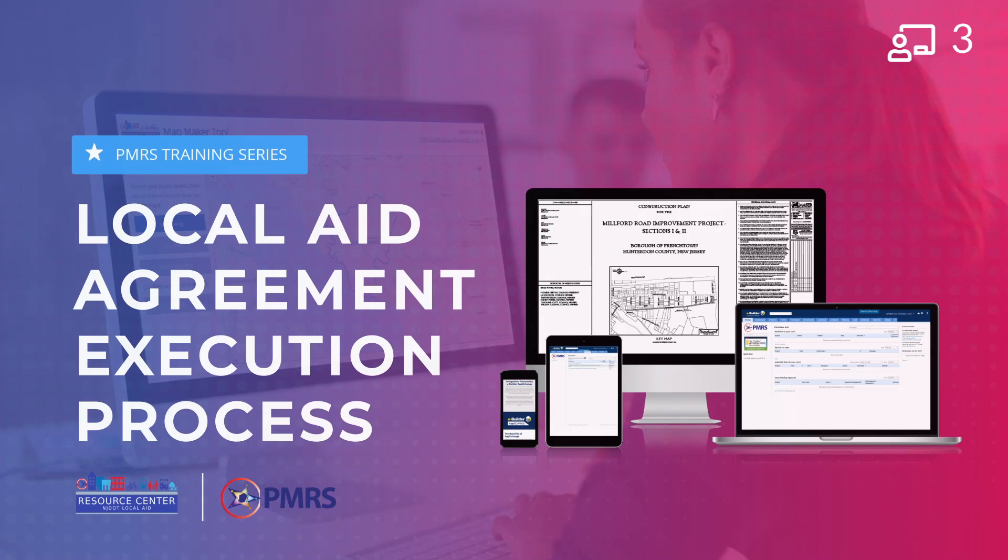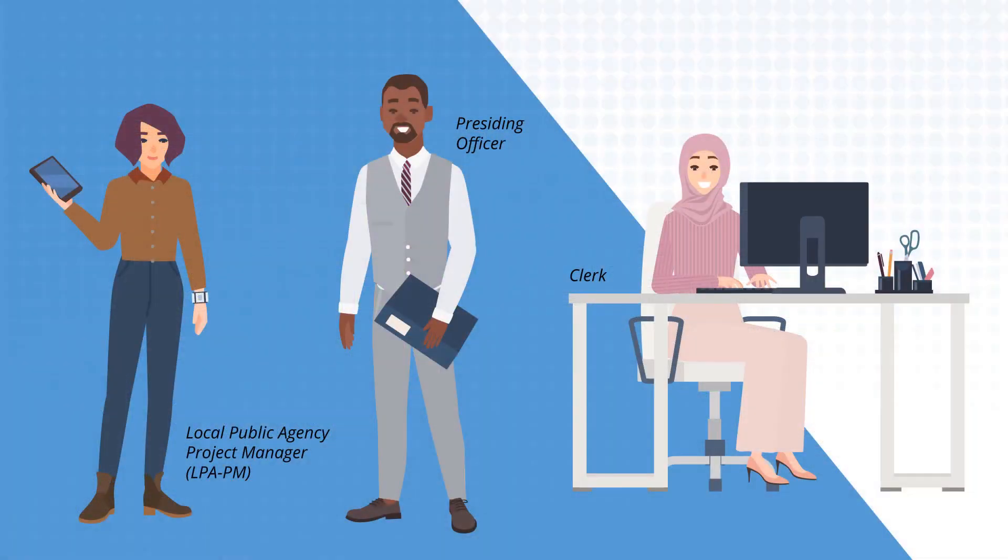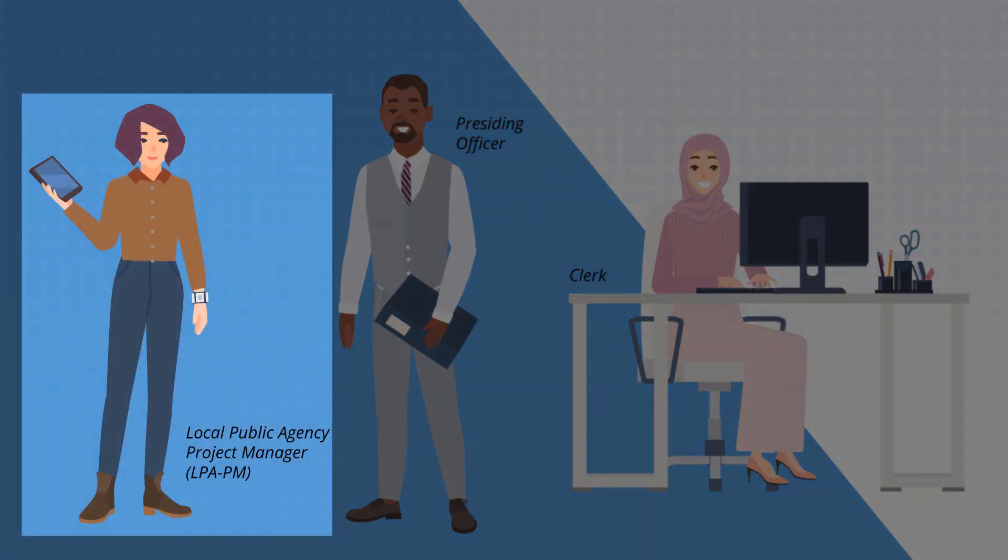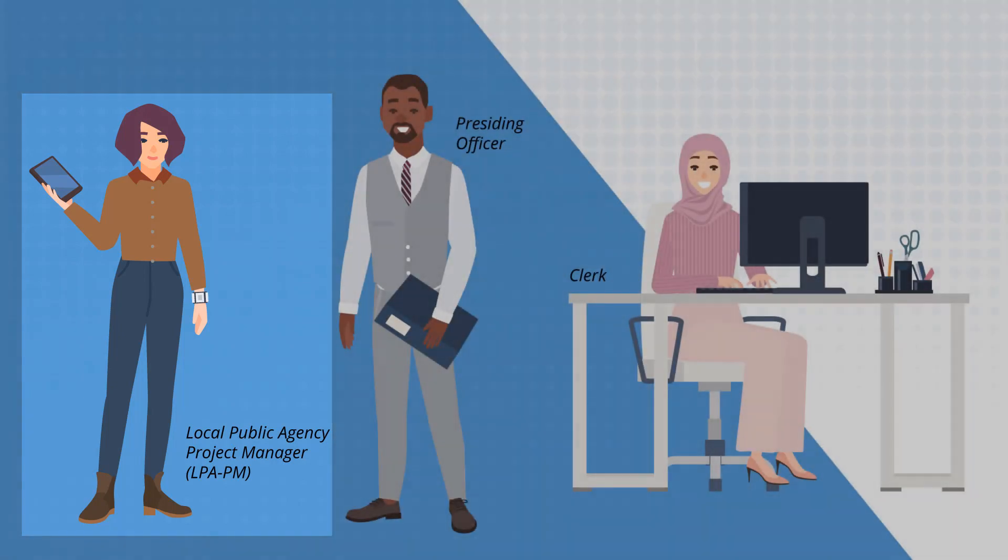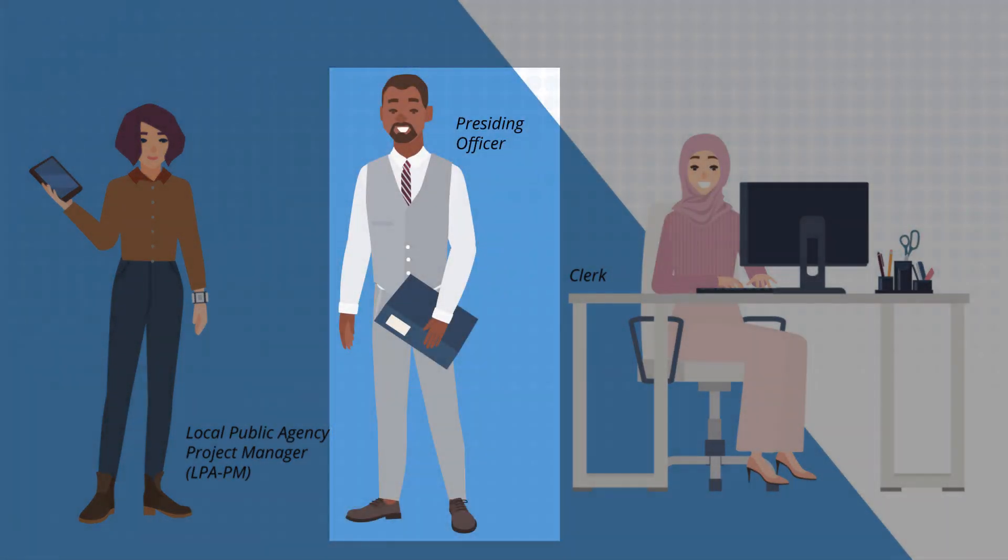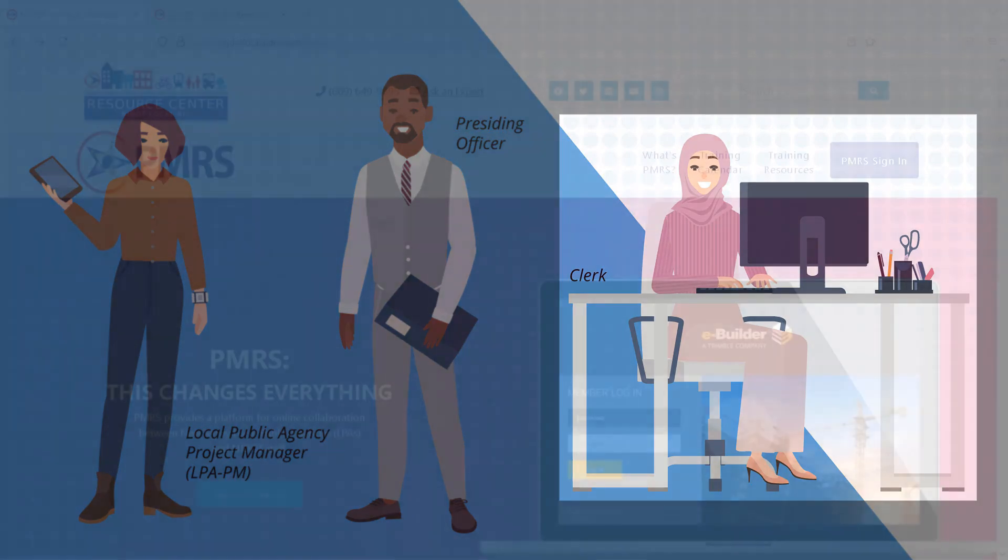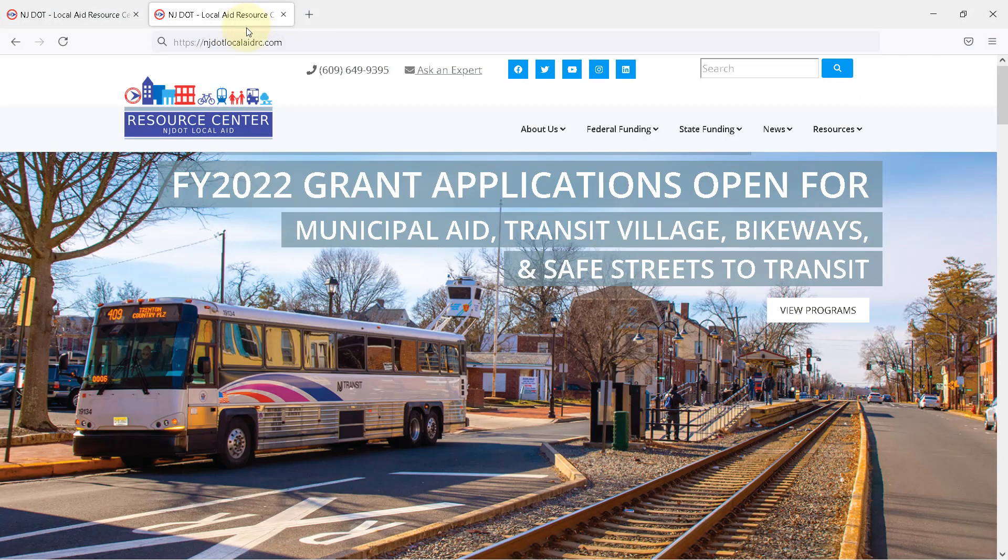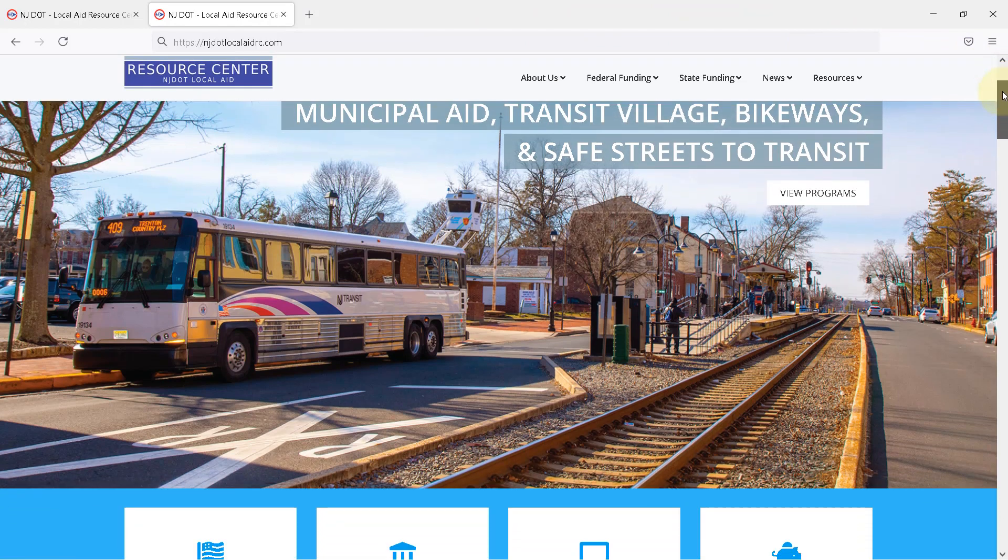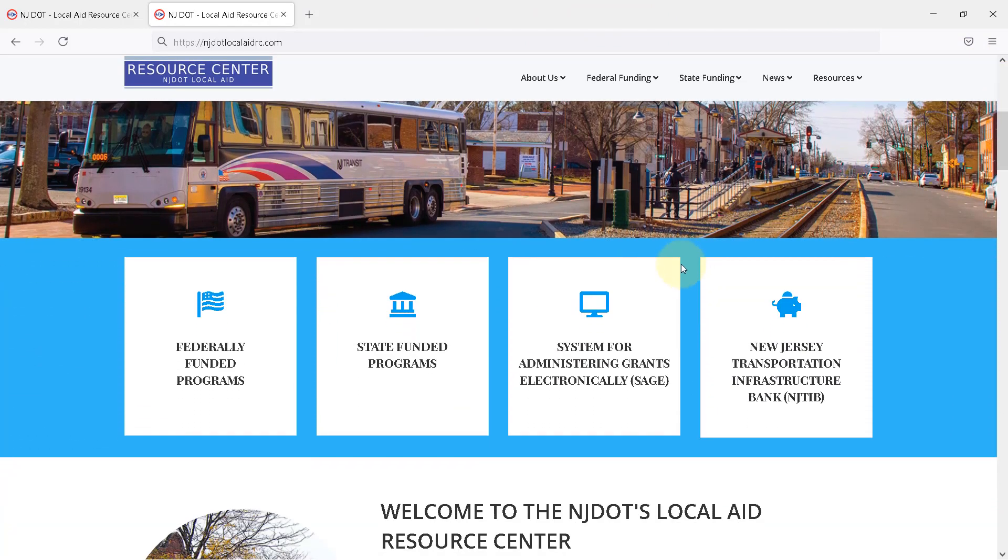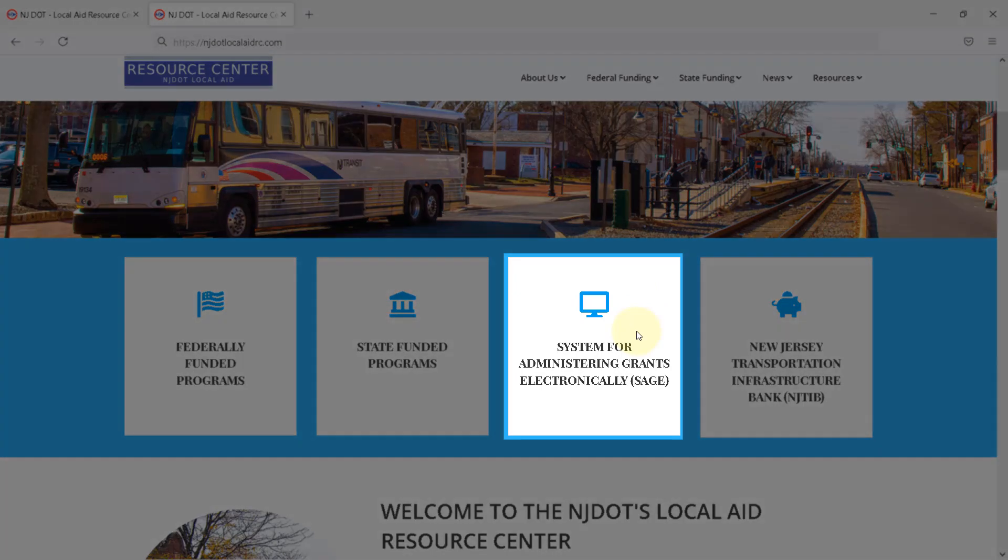This tutorial will guide you through the PMRS Resolution Submission and Agreement Execution Process, or LAAE. Actors in this process are the local public agency project manager or LPA PM, the presiding officer, and the clerk. Local public agencies will need to submit a resolution from their governing body to the Division of Local Aid within 30 days of submitting a grant application in New Jersey's System for Administering Grants Electronically, or SAGE. SAGE is accessible from the NJDOT Local Aid Resource Center website.